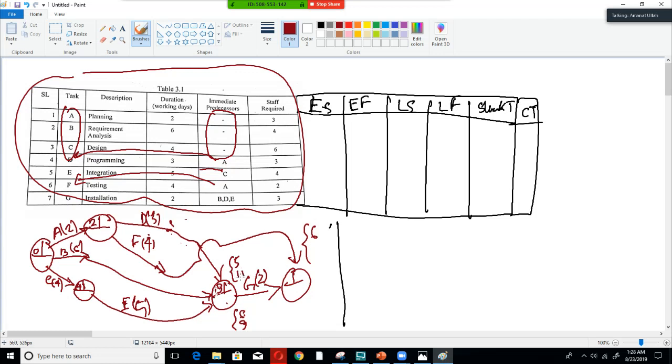So we're putting 9 over here and then if we add 9 with 2 we'll get 11, so another value is 11. And wait, this will be the maximum of 5, 6 and 9, so 9 will be the greatest, we put 9 over here. And this will have the value of whichever is greatest between 6 and 11, so this will be 11. So finally we put 11 over here and the final state is 11.